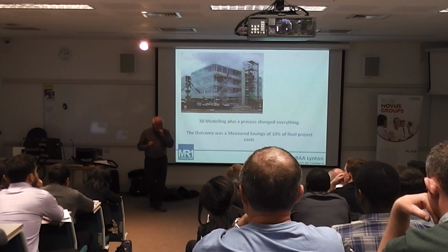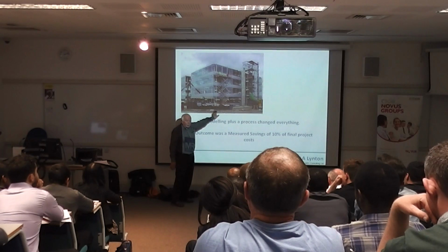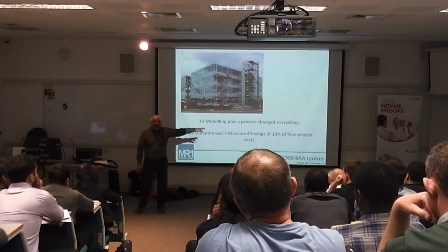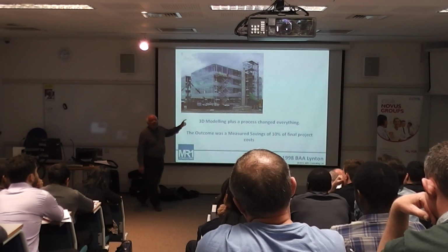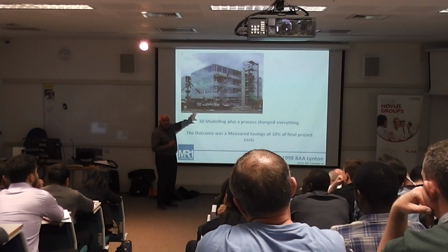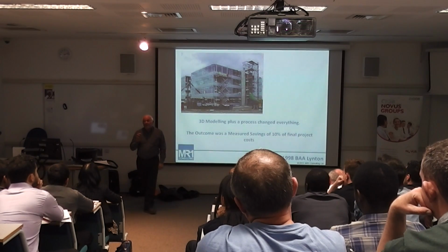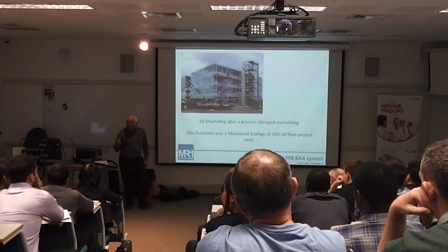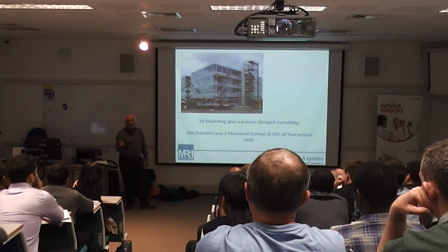a competition, and he gave us this building, which is called the People Building by an architect called 3D Wheeler. And they were building 5 of these. They'd already built 2. And following the Egan principle, put a team on it, build it, find out what you've done wrong, change what you're doing, and do the building the second time. We will reduce the cost. And in fact, that did happen. However, the building was still delivered at 25% more than the original price suggested. So although the price at tender was reduced, the outcome was still 25%.